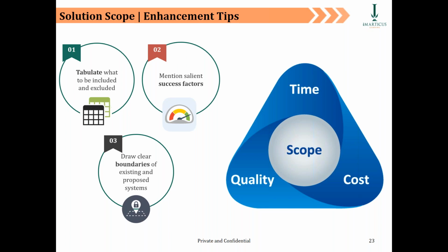So, guys, this is how business analysts should take discussion from one end to the other end, because you need to know the repercussion of what is going to be in scope and what is not. Because let me explain. If you say, hey, I want to automate every kind of workflow, all right, so that is like 1,000-day effort, but honestly your project itself is only for 500 man days. So this means, guys, you need to see which workflows need to be automated. That is included in the scope.